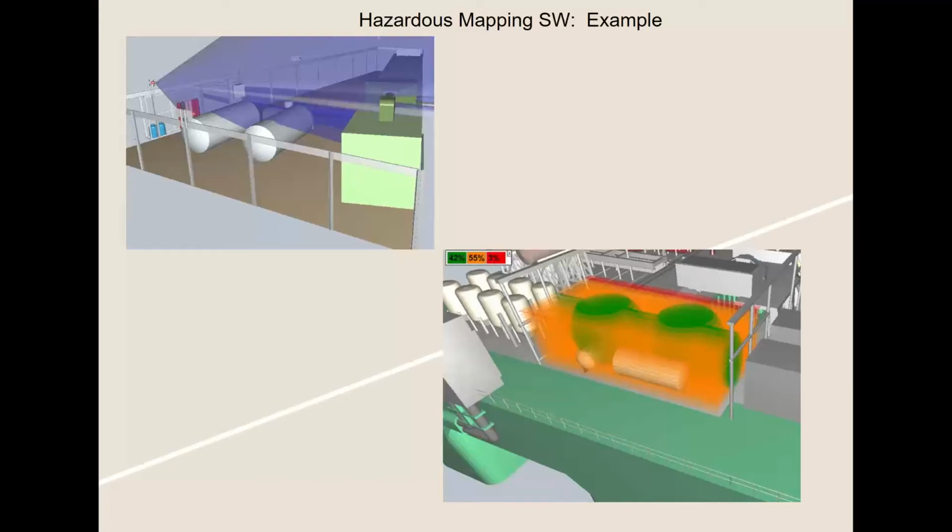And at the end of it, you get an engineering document that's about 60 pages long that details exactly why the types of transmitters they used and why they were put in the places that they were put in. So if there's ever any kind of government agency or internal health and safety folks asking the project manager, well, why are you putting these detectors where you put them? You now have a document that tells them exactly why.